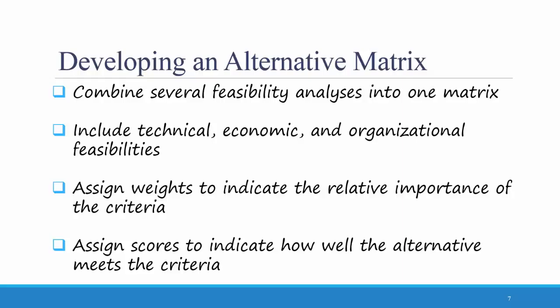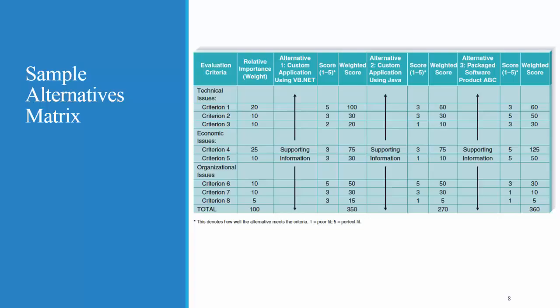You won't have to create an alternative matrix for your project in this class, but I would like you to look at this example alternative matrix to understand how it works. Across the top there are several different alternative options. The first two are developing the system in-house using either VB.NET or Java, and the third alternative is to purchase packaged software product ABC. In the first column you organize your feasibility issues — technical, economic, and organizational — and assign weighted scores for each alternative. After weighing the options, it looks like this organization should probably choose alternative three and purchase the prepackaged software, because that is the alternative with the highest score.